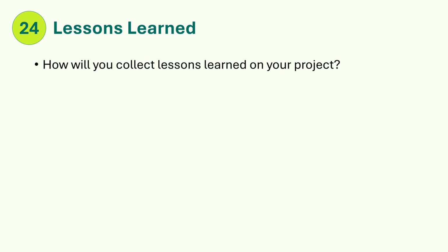Step 24. Lessons learned. Select how you will collect lessons learned and share them throughout the life of the project, not just at the end. A template is available on the WSDOT PM Guide website. Suggest having this be a regular standing agenda item during your team meetings, and everyone is invited to offer a lesson learned, regardless of whether it is positive or negative.